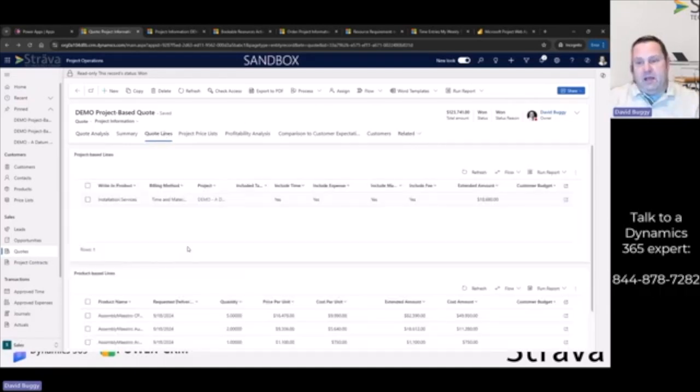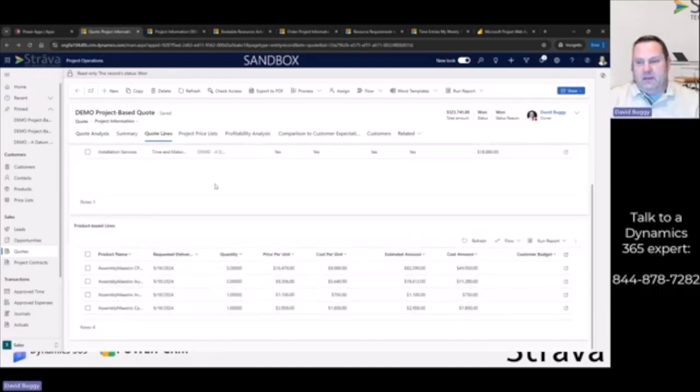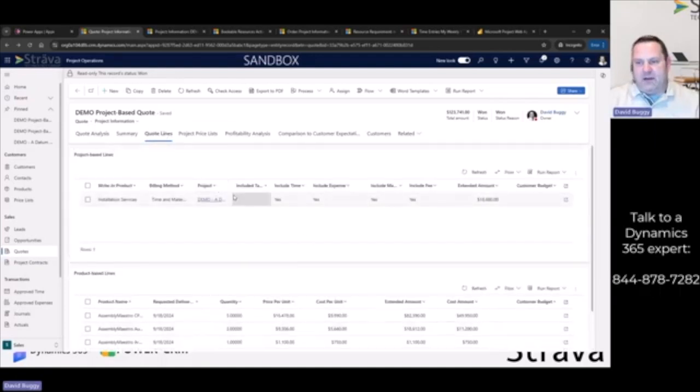And the pricing is a combination of products, quantities, the price, and our labor hours, quantity, and price, okay? So that's how you use it in a bottom-up method, right? A lot of people won't do that. They'll simply just send a quote, right? And they'll do something to estimate the services, right?